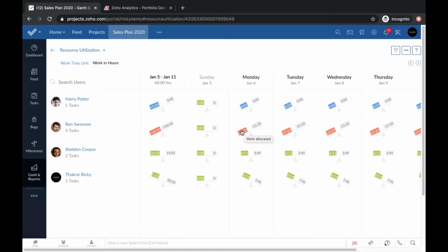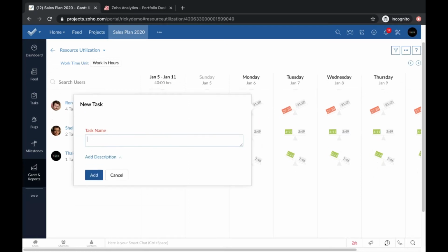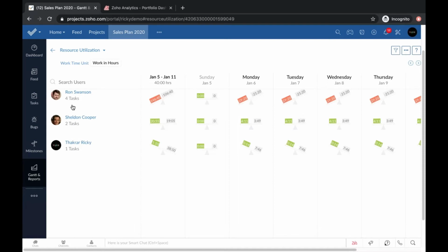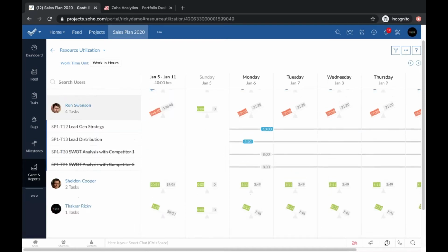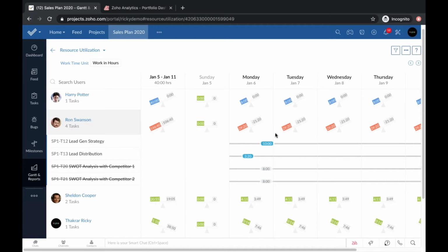So I can see here, Ron was given 29 hours of work, right? That's obviously a lot for a single day. And so what it does, it's minusing the 8 hours, and that's where you're getting your 21 from, right? So if I want to investigate what's going on, then I want to pull open the 4 tasks that he's working on, right? And see why did that many hours get logged? Well, because, right, if you add all this up, I've over allocated him too much work.